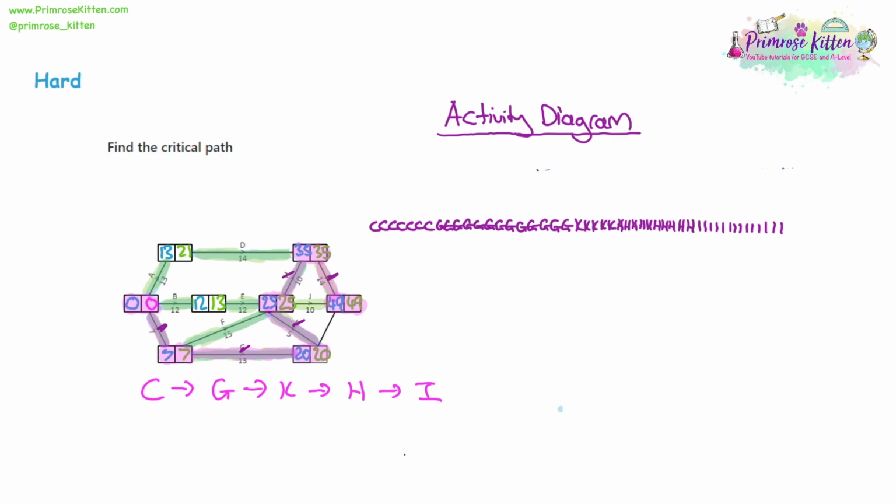Now there's 13 As. So let's start with the start. Notice I'm lining it all up. Then after task A, you can fit in task D. There's 14 of those. Then what can we fit in after that? Well, we need task B doing as well. Now task B, you can see it can finish at 13 or it can finish at 12. So what we could do, we could actually start task B at 1 and leave a gap at the start.